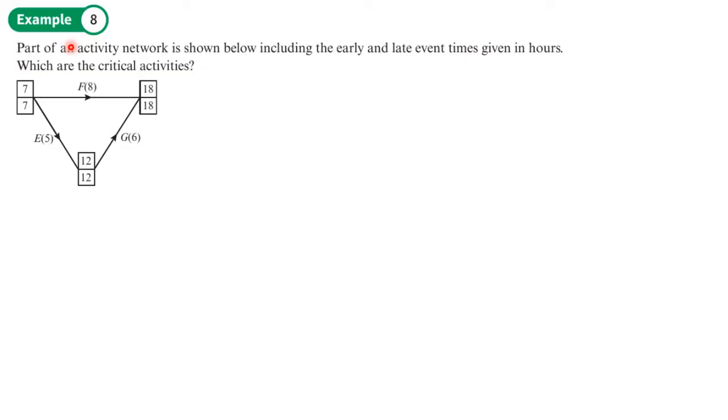Example eight: part of an activity network is shown below, including the early and late event times given in hours, which are the critical activities. Now may be tempted to say that F is critical since it's between two critical events, but seven plus eight is only 15. This will finish before the 18. So F can be delayed by up to three units of time. It won't change the finish time.